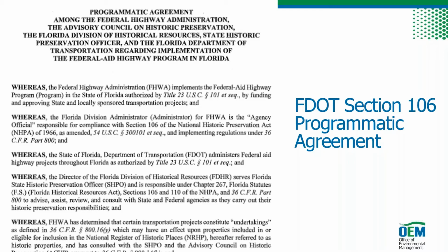If your project qualifies for one of these processes, you can meet compliance standards through minimal background research and no or very little field survey. Relevant information is recorded on forms that are emailed to DHR, and if they don't object within 30 days, then your project is compliant with cultural resources regulations and you can move on.